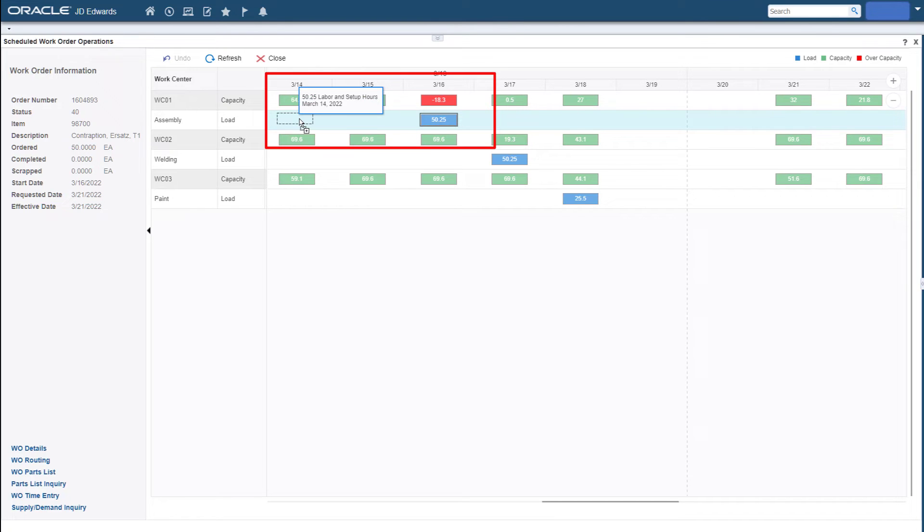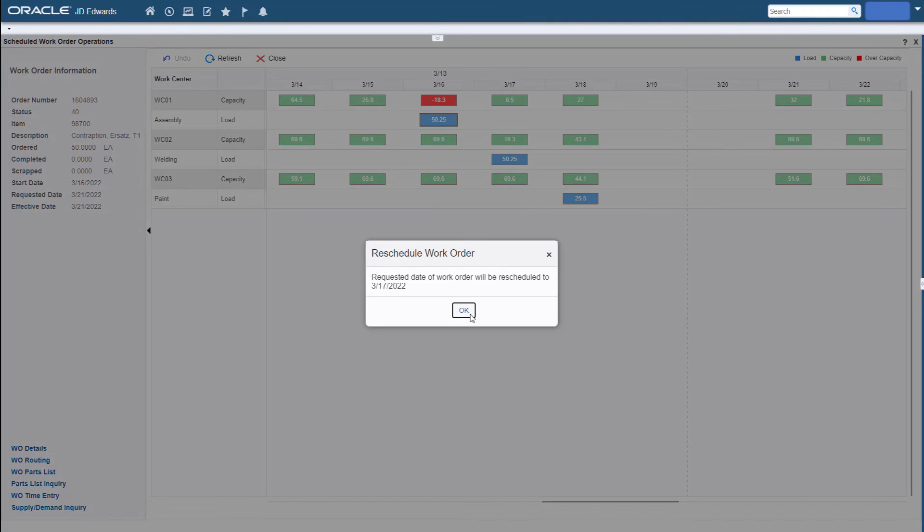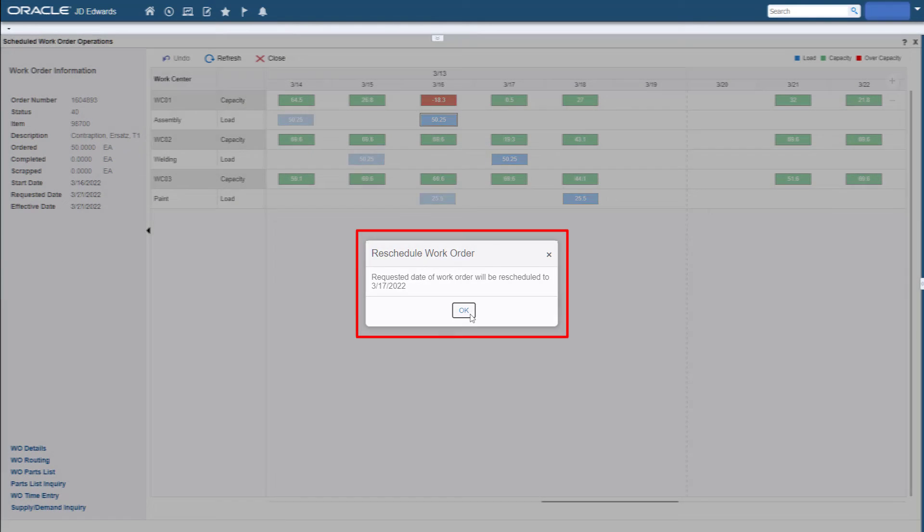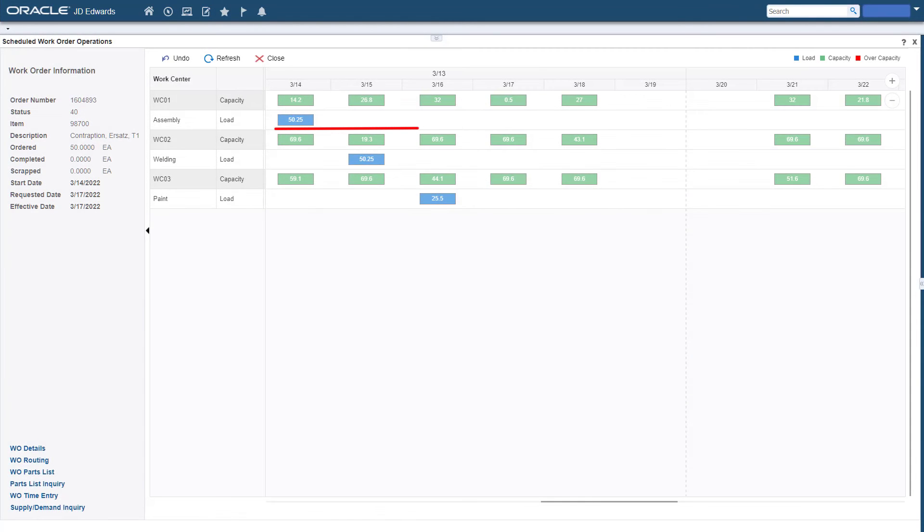Dragging and dropping any operation to a new date triggers an update to the work order requested date and a rescheduling of the parts list and routing accordingly, with the results of any change to the work order made immediately visible.